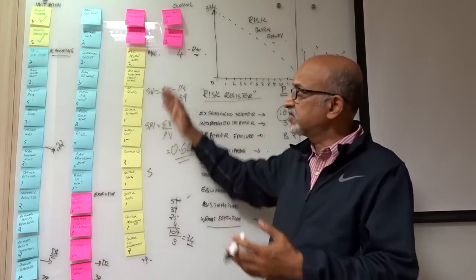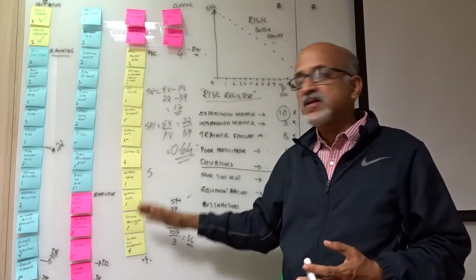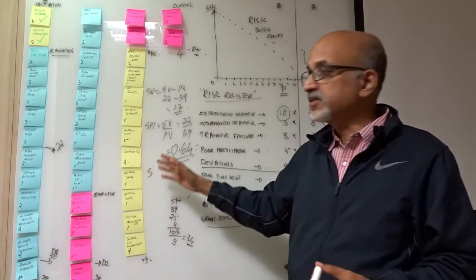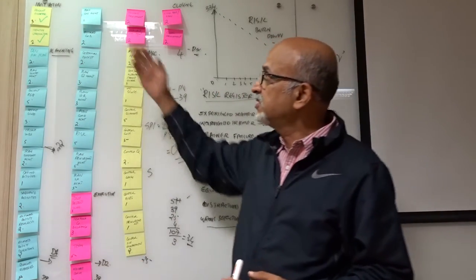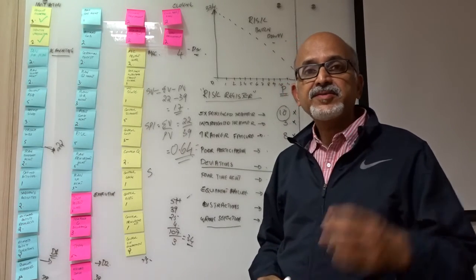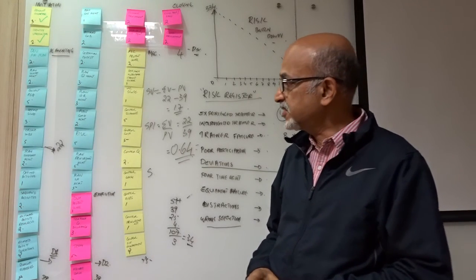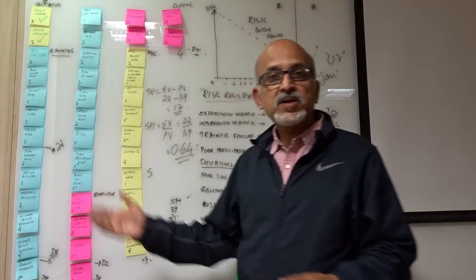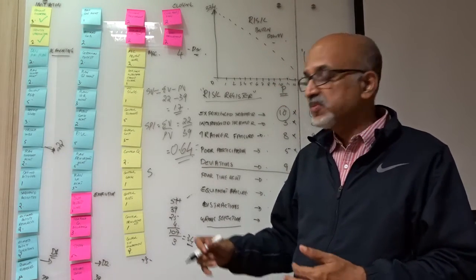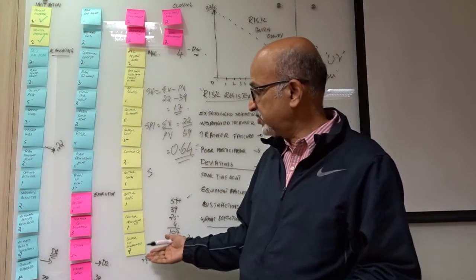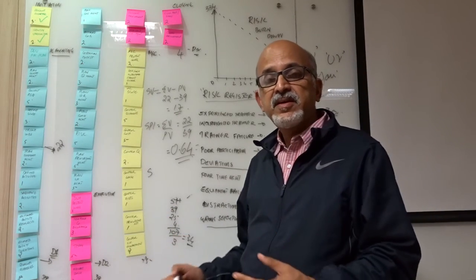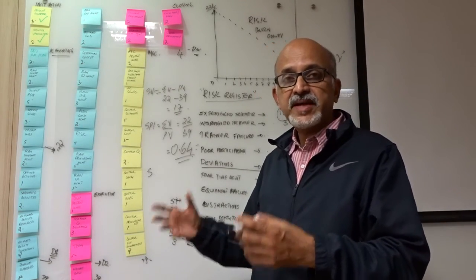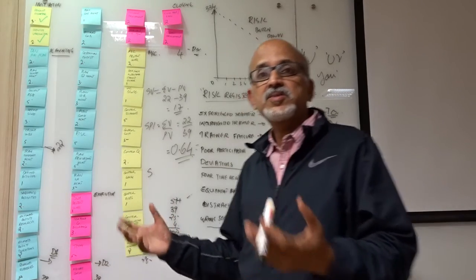First we did a training breakdown structure or a work breakdown structure, and for each of the elements of the work breakdown structure we gave a size estimate based on the Fibonacci series, and then we could work out the plan value. The cumulative budget for the training we divided by 3, so that becomes the budget for each day, and then we are able to track our earned value against the plan value.